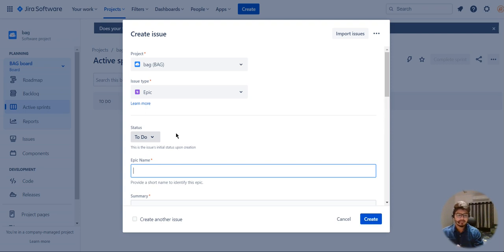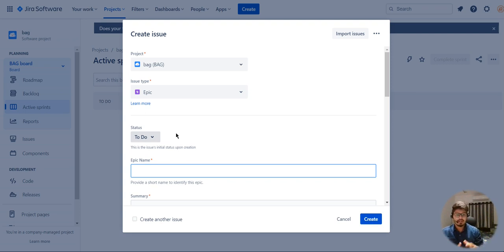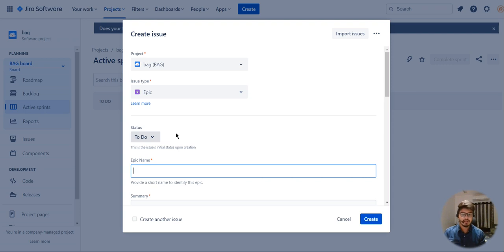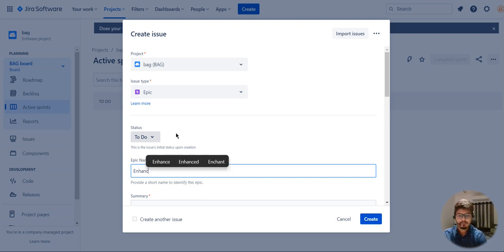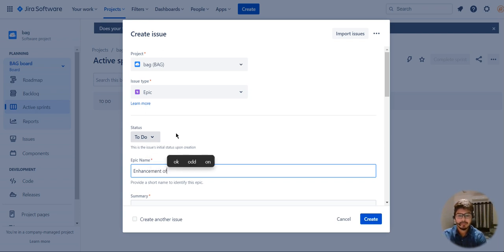My epic would be something that is defining the user stories. For example, I am going to build a project and that project is overall website development. But under website development there are different tasks. The main task for me is to enhance all the existing features — so the epic is enhancement of website features.